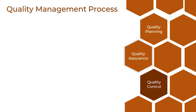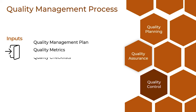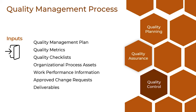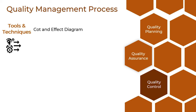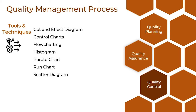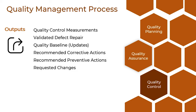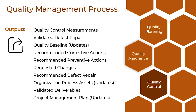Then we have to perform quality control as our last phase. Inputs include quality management plan, followed by quality metrics and quality checklists. Then we have organizational process assets and work performance information, as discussed in the other two phases. We also have approved change requests and deliverables as inputs. Coming to tools and techniques, we have cause and effect analysis, control charts, flow charting, histogram, Pareto chart, run chart, scalar diagram, statistical sampling, inspection, and defect repair review. Coming to outputs, quality control measurements, validated defect repair, updated quality baseline, and recommended corrective and preventive actions. Then we have required changes, recommended defect repair, organization process assets, validated deliverables, and updated project management plan.